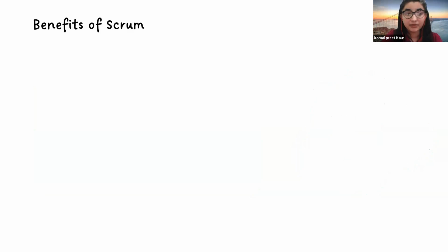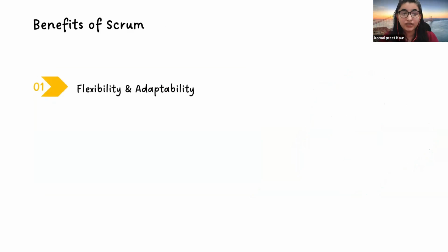And next comes the benefits of Scrum. It is flexible and adaptable, right? Because we are breaking a big chunk of work into small sprints, and we have an option to change the requirements. Like in the first sprint, if we launched 5 main features, but in the next sprint I want to change anything from those 5 features, I can cover that in the next sprint, I mean the next 2 to 4 week cycle.